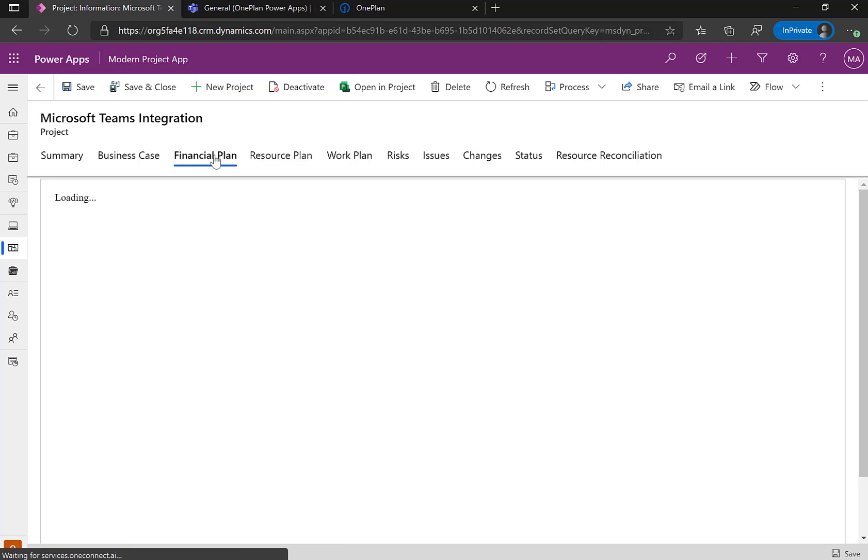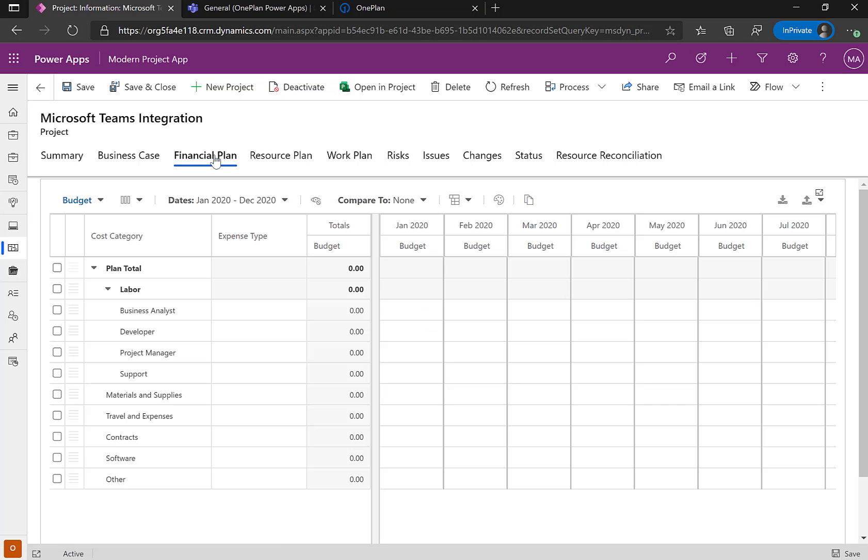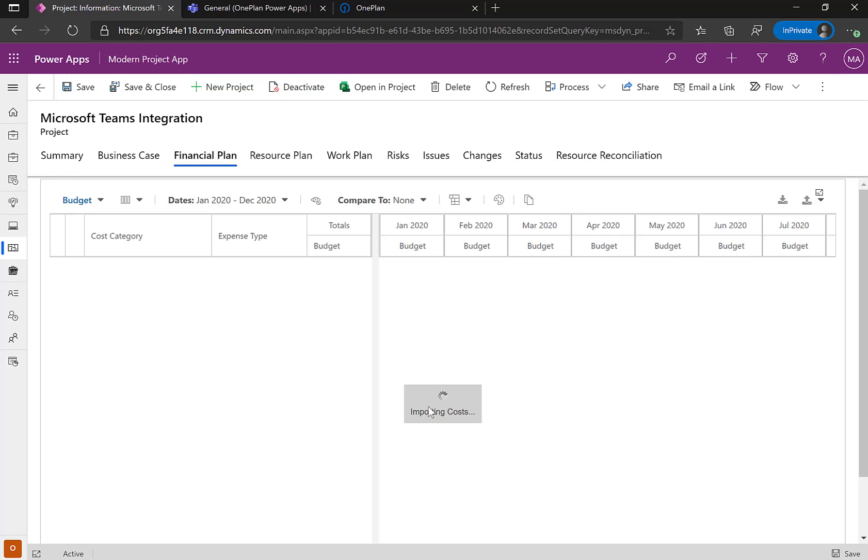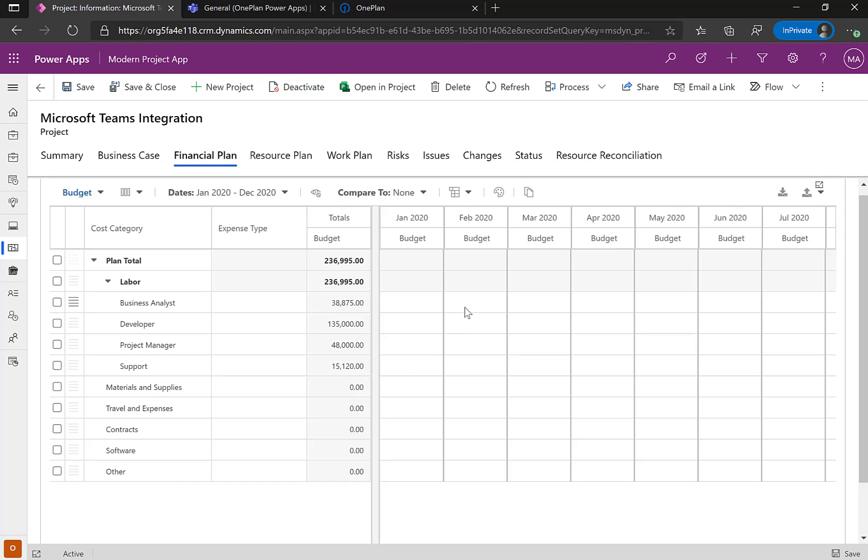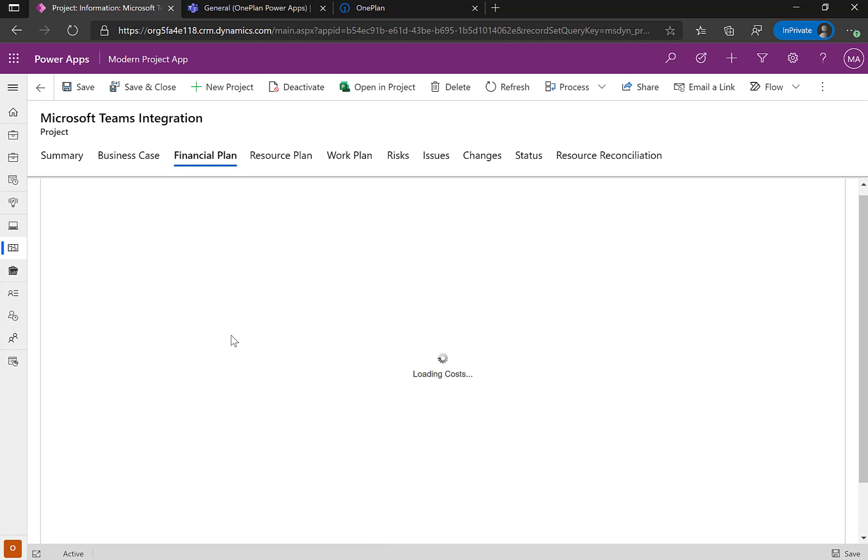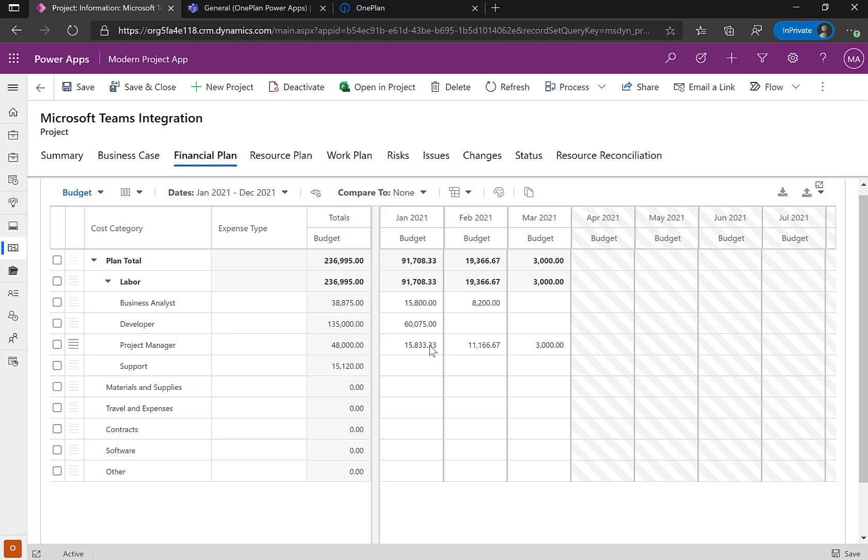I can also do financial management for budgeting or capital CAPEX and OPEX. And so I'm going to go over to my financial plan. I'm going to also click on import here. So this is going to bring in from my Microsoft project desktop file that I brought in. I believe it's next year is where we do planning for costs. And you'll see here that it's already populated my financial plan for my Microsoft project file.